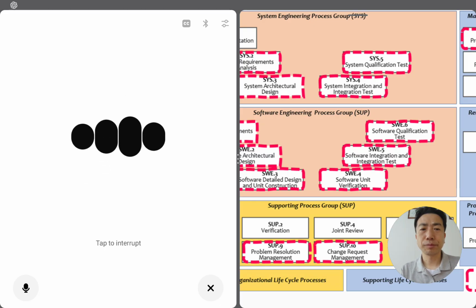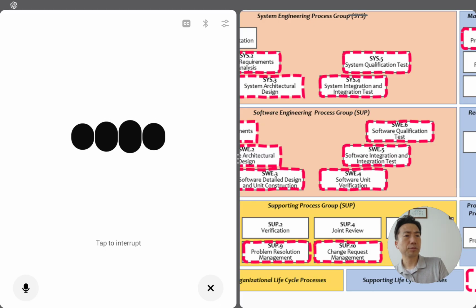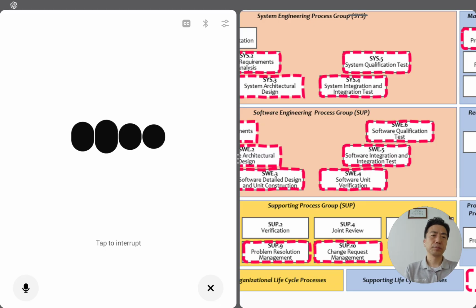Yes, it's possible, David. Many smaller teams do that. One person can handle both CM, configuration management, and CRM, change request management, but it depends on workload and system setup. If one person takes both roles, the key is separation in practice, not in name. That means when they act as CM, they control versions and baselines. When they act as CRM, they manage change requests and approvals. It's fine as long as each action is traceable and not self-approved. For example, you can prepare a baseline as CM, but another approver must still sign off. Do you think your team's system, PLM or ALM, could keep those two tracks clear enough for one person to manage both?